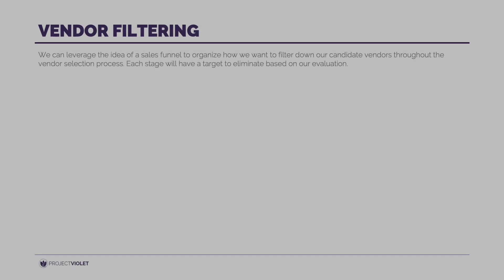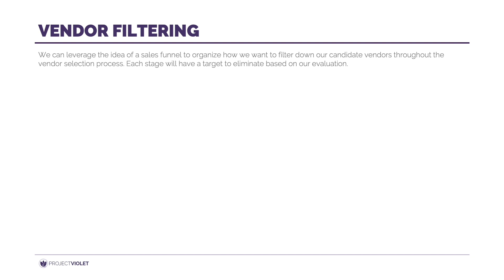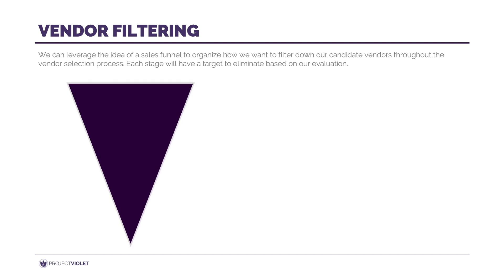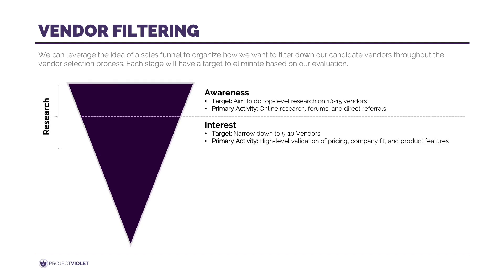With preparation done, we can move into how to conduct research on vendors and organize the information you find. One way to visualize the remaining phases is using the idea of a sales funnel. The research phase is entering the top of the funnel, gaining awareness of what's out there and narrowing down to vendors of interest. In the research phase, target 10 to 15 vendors for top-level research and then narrow down to about 5 to 10 vendors that will progress into the evaluation stage.